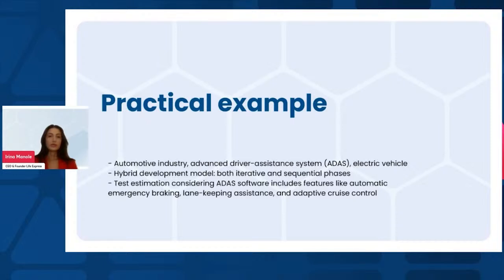Next step would be selecting estimation techniques that are useful for our testing project. Given the complexity of the product and the hybrid model, you might choose to use wideband Delphi, for example, for the more complex aspects, such as safety critical features, and planning poker for estimating tasks in the agile phases.